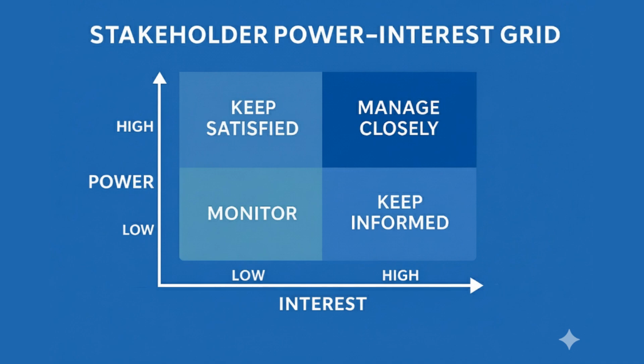Once you know the interest, expectations, authority, influence level, you need to plan to involve them, engage them. How will you handle communications with them? What information needs to be shared? When does it need to be shared? Do you need to share detailed information or high level information or partial information or complete information or only sensitive information? Or is it okay if they only require a weekly summary report?